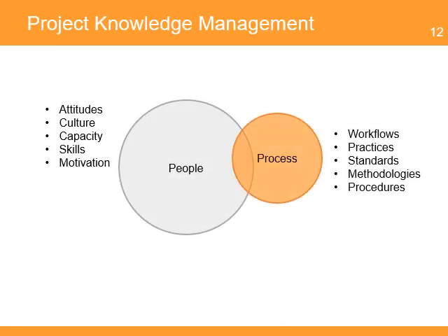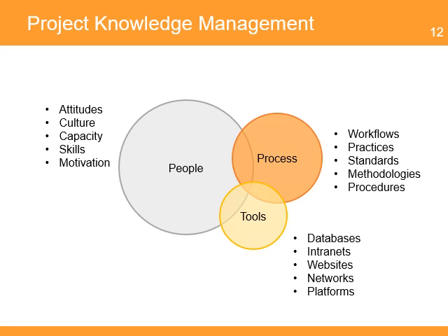Knowledge management involves process, people, and tools as overlapping components. None of the three knowledge management components is focused on alone. All are considered at the same time. Knowledge management yields maximum benefits only when all the components are addressed. All three components are vital for successful knowledge management, but the effort required to implement them is different. People require about 70% of the effort, process 20%, and technology the remaining 10%.